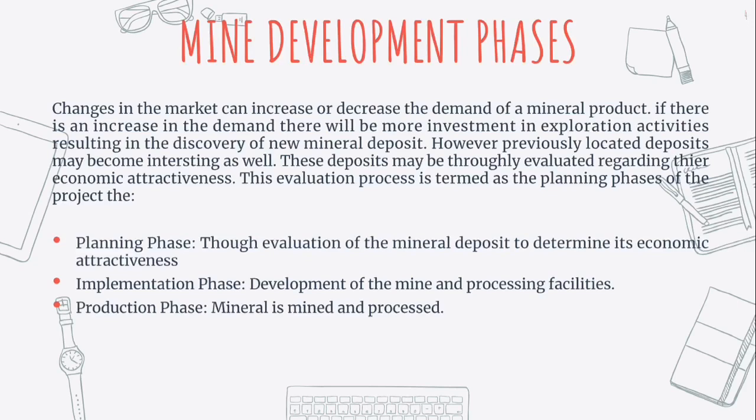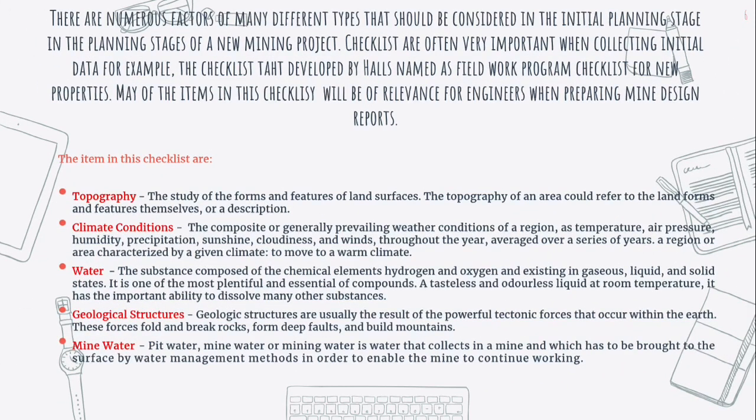The role of the mining engineer starts from the planning phase and continues up to the production phase. There are numerous factors of many different types that should be considered in the initial planning stage. In the planning stage of a new mining project, checklists are often very important when collecting initial data. For example, the checklist developed by Hall, named the Fieldwork Program Checklist for new properties. Many of the items in the checklist will be relevant for engineers when preparing mine design reports.